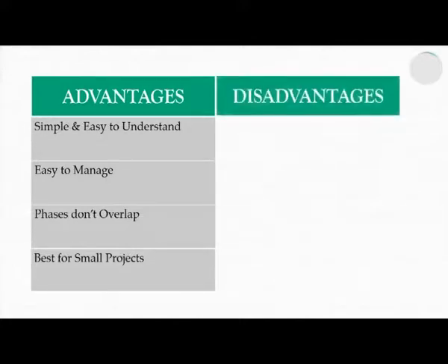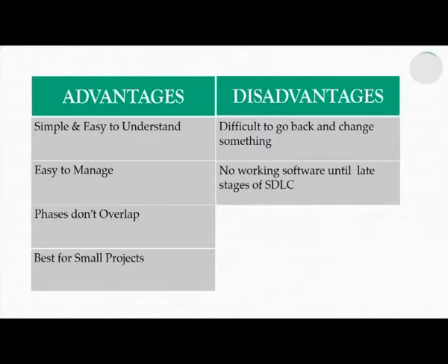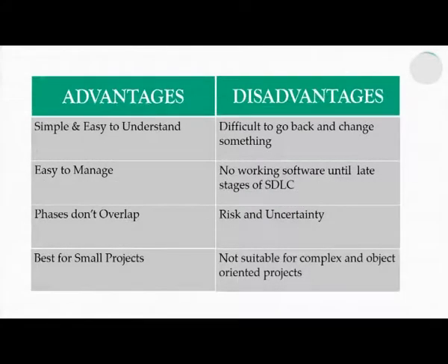Some of the disadvantages are evident too. Since every phase is signed off once completed, it is very difficult to go back to any phase and change something that was done incorrectly in the beginning. The stakeholders have to wait until the end of implementation to get a working software. Sometimes this might not go down well with the anxiousness of stakeholders. There is a lot of risk and uncertainty attached to the projects because every phase has to be done perfectly, else fixing bugs can cause a lot of expenses. And finally, the waterfall development model is not suitable for long, complex and object-oriented projects where the requirements are not fixed.